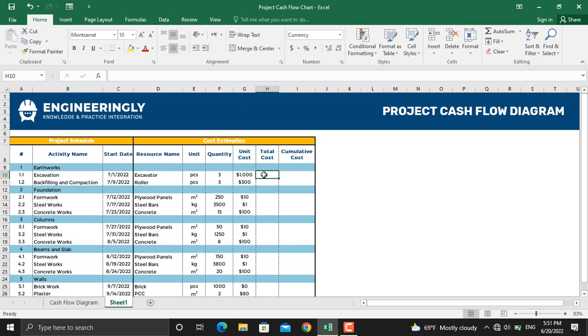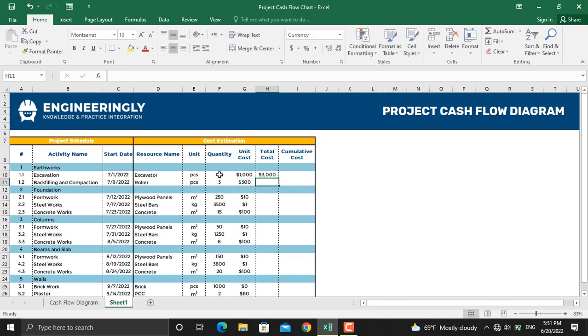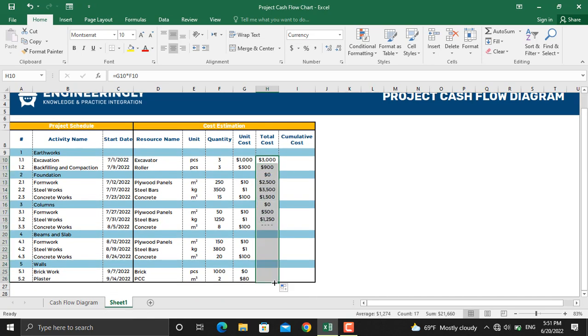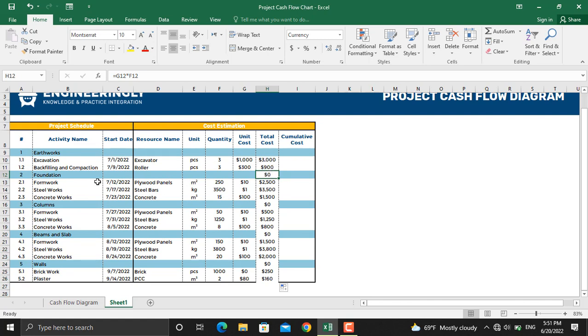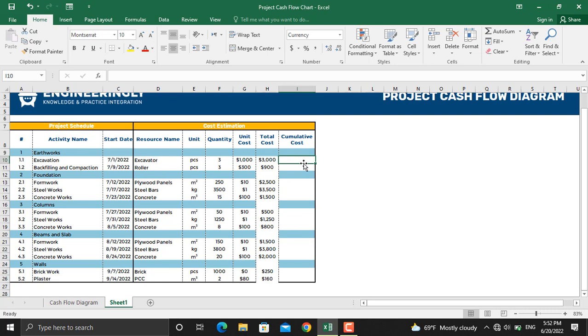In here I will write down equals sign, unit cost times quantity. I will select the cell and drag it up to the last activity. Since we have the cost for the activity level, the work package level is zero. I will delete the values in these cells. Next thing is to calculate the cumulative cost.